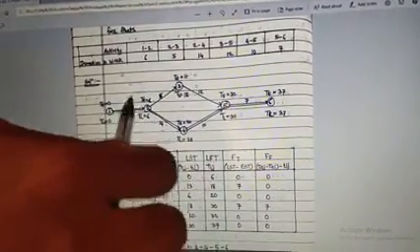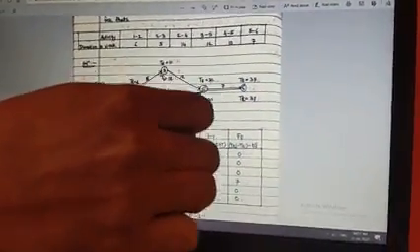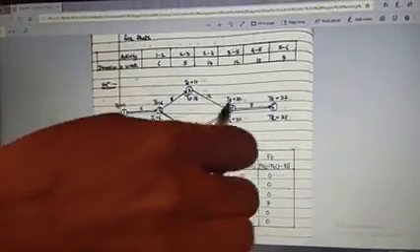So what I mean to say is, after completion of these 3 activities only, I can go for this 5th to 6th activity. That is why the early start time for this activity will be the addition of the previous 3. So this is all about calculation of EST, early start time.